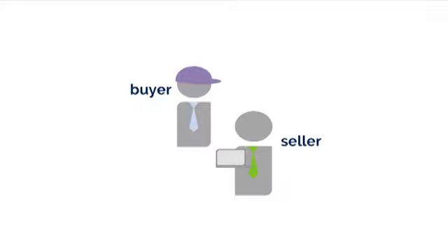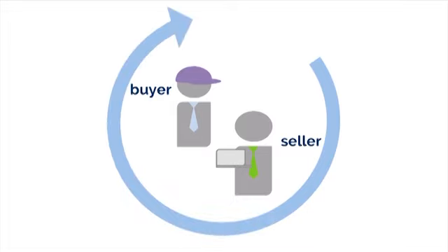Another important point to note is that this process has a financial management component that involves monitoring payments to the seller. Monitoring involves performance reviews to measure a seller's competency for performing according to the requirements of the contract. This ensures that payment terms defined within the contract are met and that seller compensation is linked to seller progress, as defined in the contract.